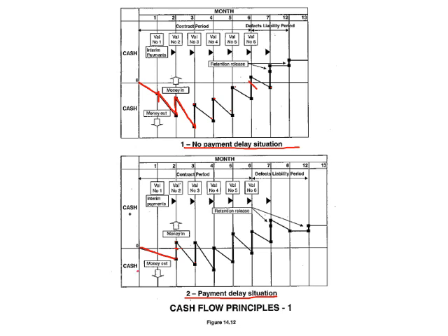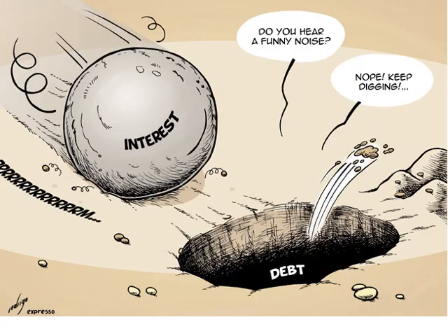So the amount of money that you have to borrow to finance this project is actually lessened, whereas you would have had to borrow that amount of money at one stage. Now you only have to have this amount as stated. And the main thing about getting this alleviated is to prevent as much interest as possible, because interest eats into your actual profit.